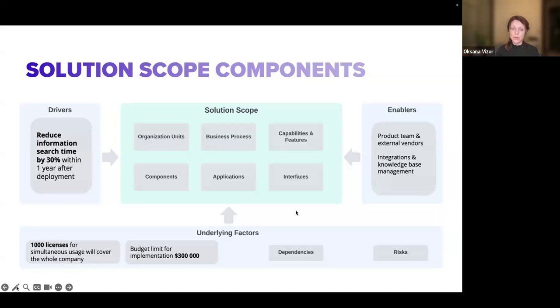If we are talking about the next underlying factor, I mean dependencies, here we mean some other tasks, projects, or anything else that relies actually on the completion of different other things. So we cannot proceed with this initiative if we do not, for example, implement some other things, tasks, or projects. Of course, we have interdependency. And if we are talking about AI assistants, first of all, we have the dependency on the databases. Of course, there is the need to aggregate 3 different databases into one. Of course, you may list other dependencies for this project and for any other, but here this is the most important one.